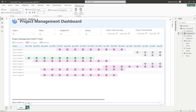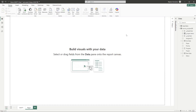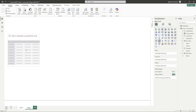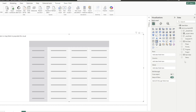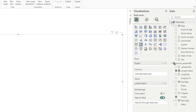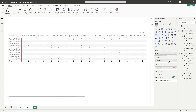Now let's start a new report page and build this. We're going to create a matrix visual, putting our project in the rows and the project status measure in the values. We'll also bring in month and year from the dates table into the columns. We now see a table full of numbers — but this is the essential foundation of our Gantt chart, and all we need to do is apply some conditional formatting.